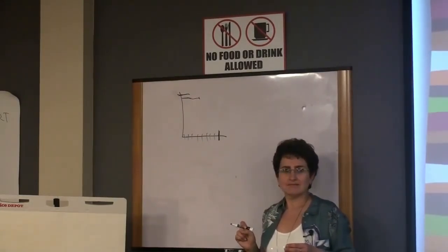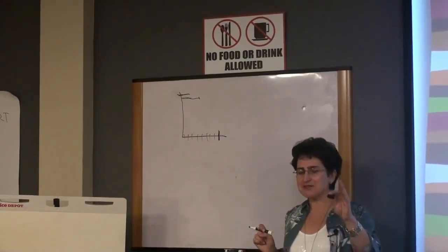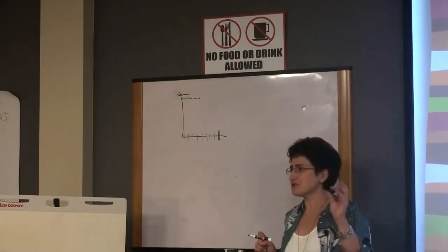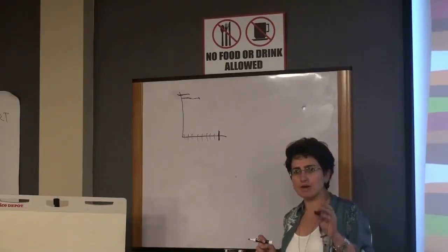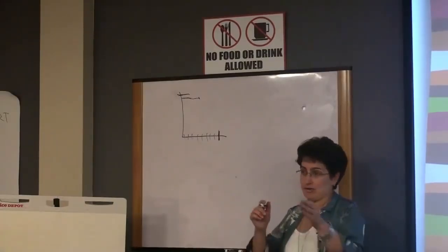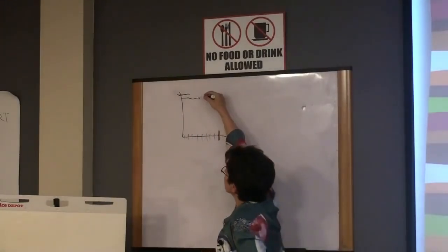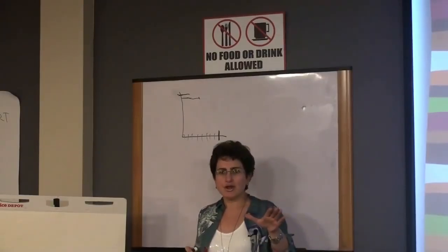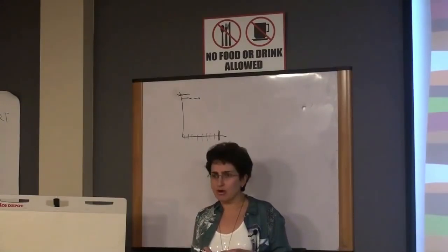Drop. Do what? Drop the product. No, drop the product is not the right answer. However, you can drop your sprint. You can terminate your sprint. If you are stuck for objective reason, one more reason for us being stuck because the feature is too complex, and then at some point the product owner comes and says, you know what, this feature is no longer needed, right? In which case you can terminate your sprint.